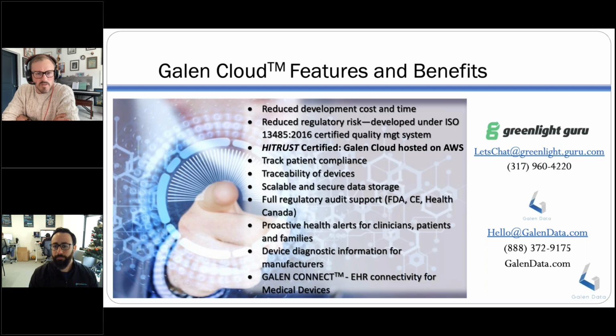Well, yeah, Dwayne, what do you think? Any others for you? Enrollment comes to mind, number of people, number of sites, right? These are all things that will just drive costs way up. Enrollment is the biggest question mark, because if it doesn't happen the way you think it does, those are hidden costs, right? If you preemptively add a site, you kind of know what that cost is. If you know how many people are going to be in the study. Enrollment is just the biggest unknown, right?